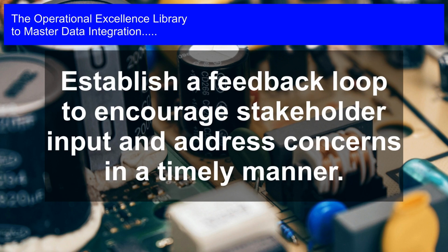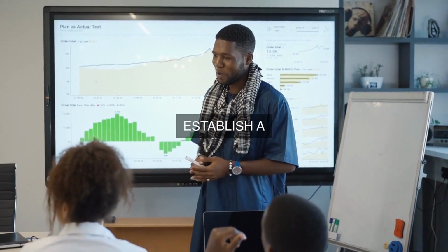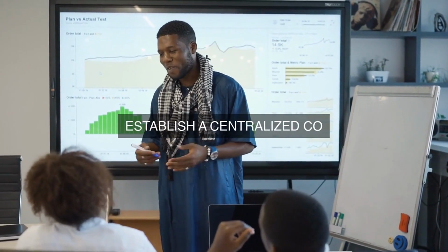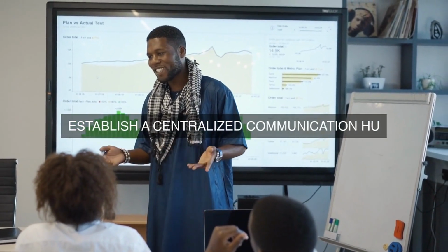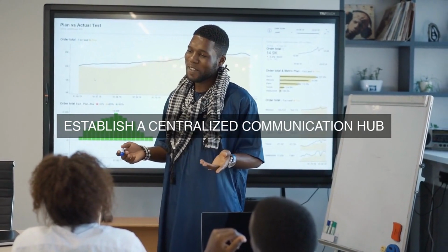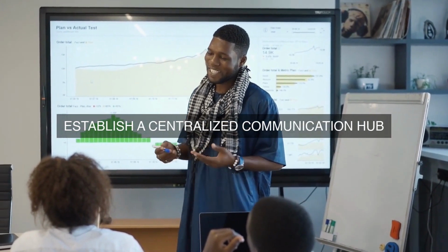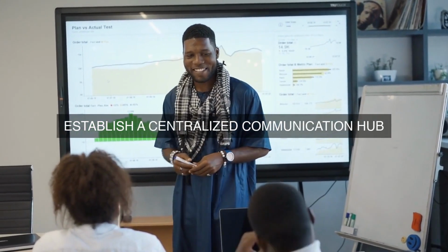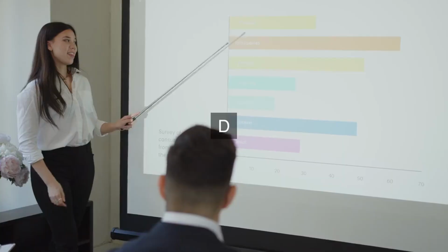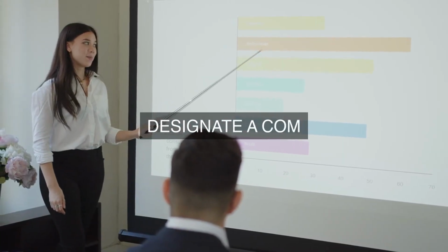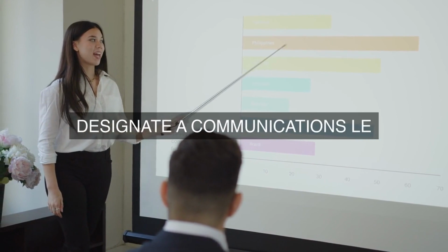8. Communication metrics. Establish metrics to measure the effectiveness of the communication plan, such as stakeholder satisfaction surveys to gauge their understanding and engagement, response rates to regular status updates or email newsletters, timeliness and quality of feedback received from stakeholders.